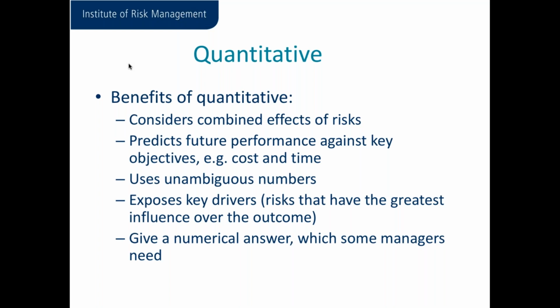We're talking about combining the effects of risks, predicting future performance against key objectives, using unambiguous numbers, so we're getting really down into the detail here. Exposing key drivers, so we can actually see which risks have the greatest influence over the outcomes. And we're giving some numerical answers. We're saying that something will cost a certain amount, or there's a range of costs or a range of times that we'll either lose or gain.